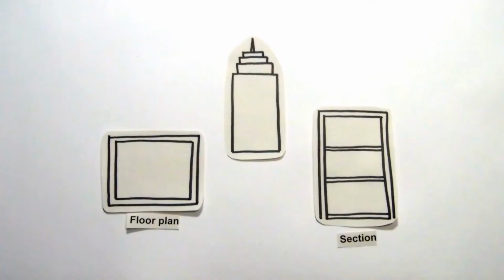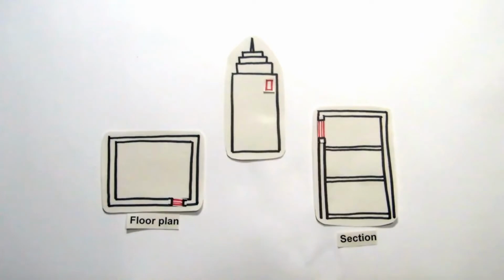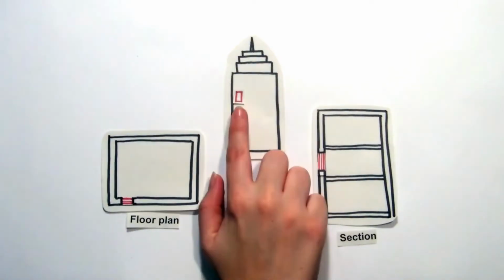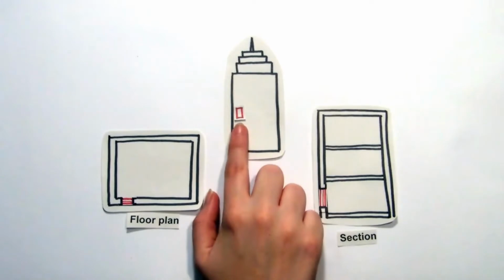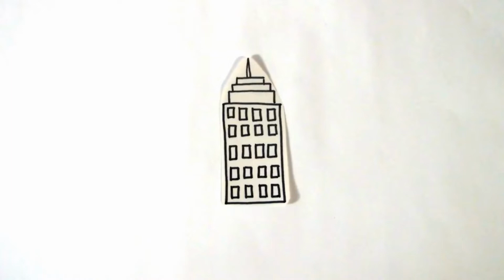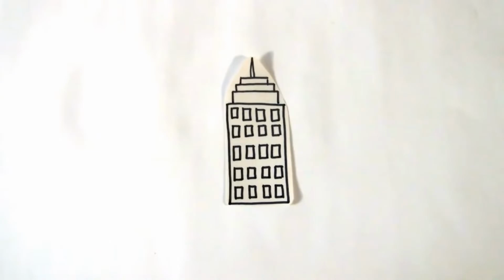Change management. Since data is stored in a central place in a BIM model, any modifications to the building design will be automatically replicated in each view, such as floor plans, sections, and elevations. This not only helps in creating the documentation faster, but also provides stringent quality assurance by automatic coordination of the different views. Building simulation. BIM models contain more than just architectural data. Information about the different engineering disciplines, sustainability information, and other characteristics can be easily simulated well in advance of actual construction.